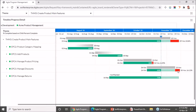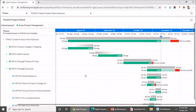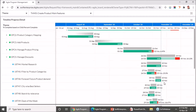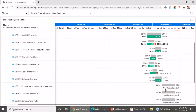While this is the visualization for your theme and epic progress, you could also drill down and look at some of the items planned for an epic. In this case, I have a bunch of user stories planned as part of this epic — some have been completed, some have slipped, and some have yet to begin. In all these cases, you will see a plan bar. Team members may not always provide planned start and end dates for a user story, so based on the sprints they are tagged to, we derive the plan duration. If there is only a release tag, the plan duration will be as per the release date.